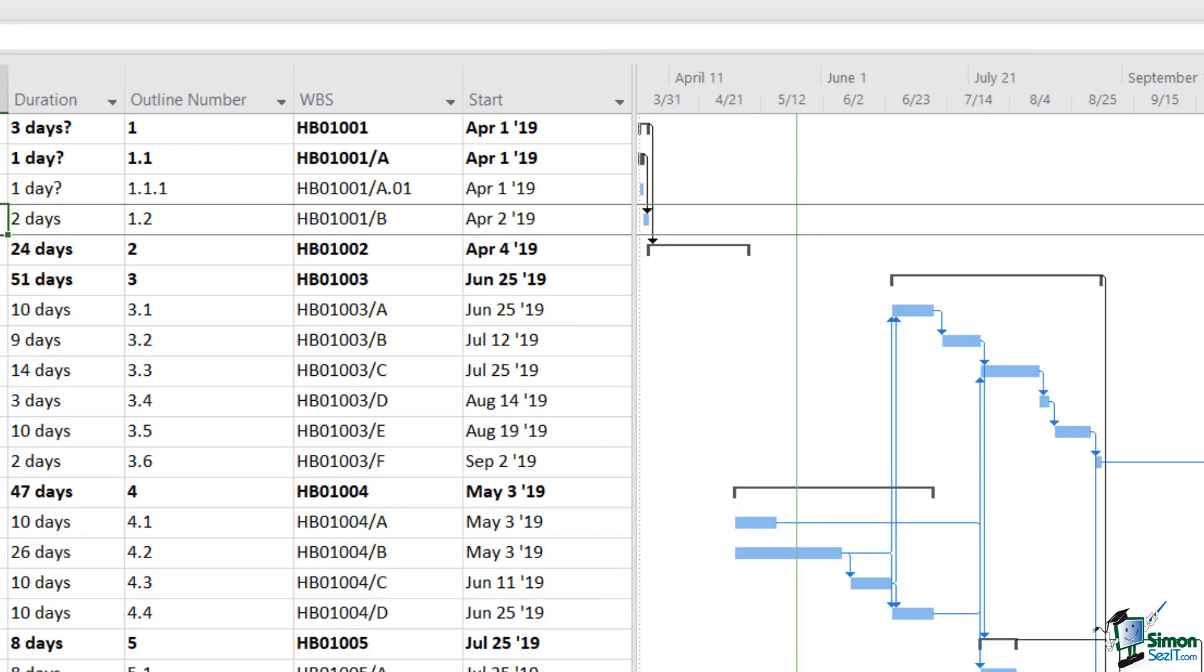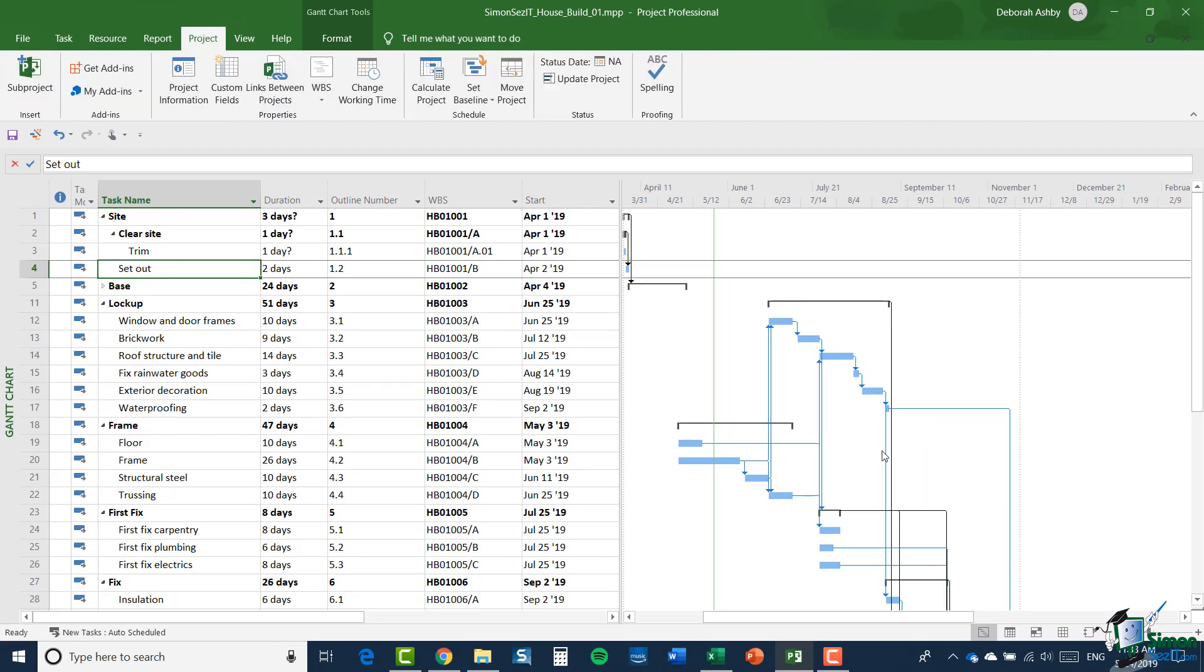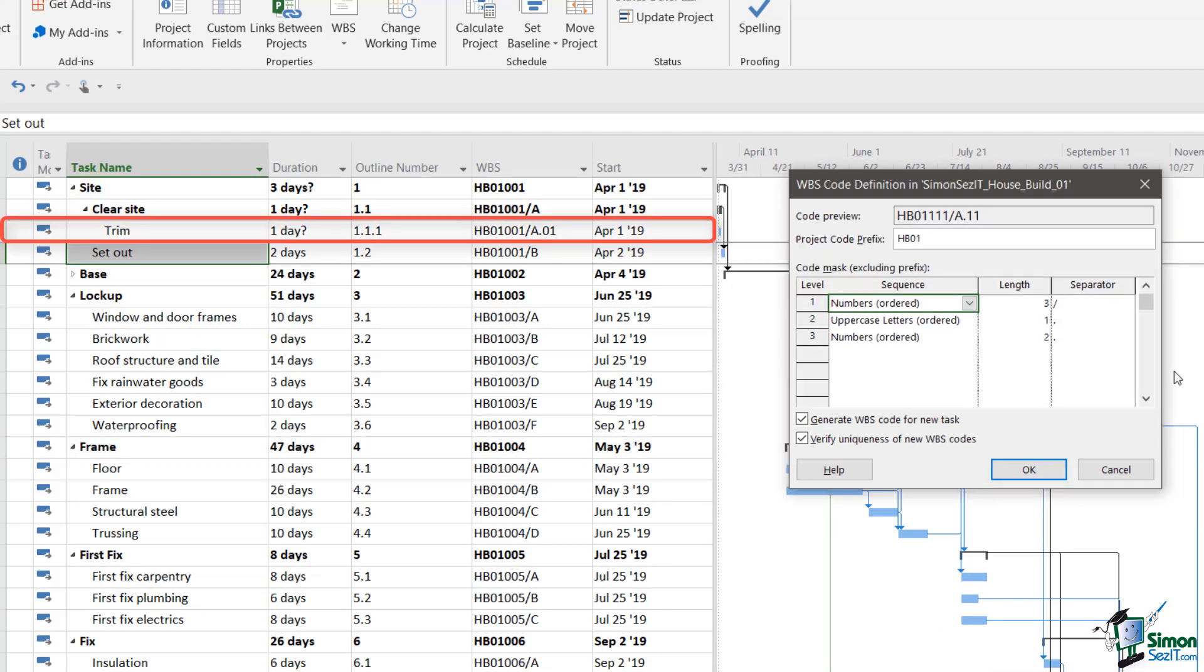Now all of the tasks in my project have been given WBS codes. Let me bring up that dialog again and just look at those three levels that I set up, and let's look at the task here, trim. First of all, HB01 project code prefix. Note I didn't put any separator after HB01. It runs straight into the code itself. And the code itself is three numbers in sequence, so 001 is the first. The separator is a slash, then it's a single uppercase letter, so in this case A, then a full stop, and then an ordered number 01. So that's two numeric digits, or number length 2.